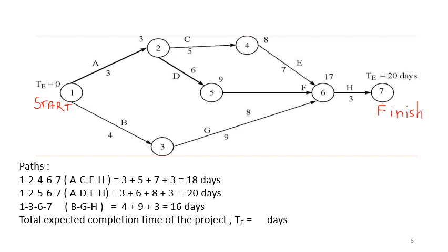So your objective now is to find the critical path. The network diagram has been shown. You can see here in the network diagram all the activities are shown. The activity C here, according to the precedence relationship given, can only start when A is complete. Similarly, activity D can start only when A is complete, because C and D are dependent on A. Similarly, if you consider activity F, F can start only when D is completed.